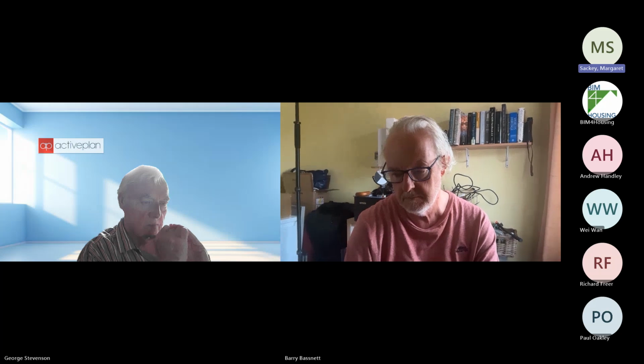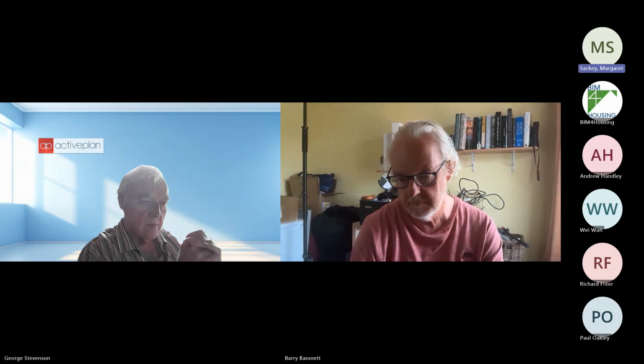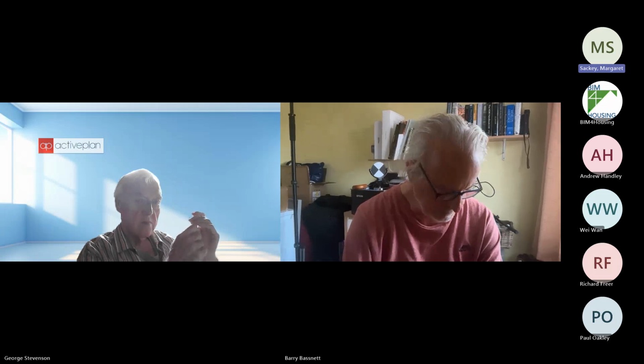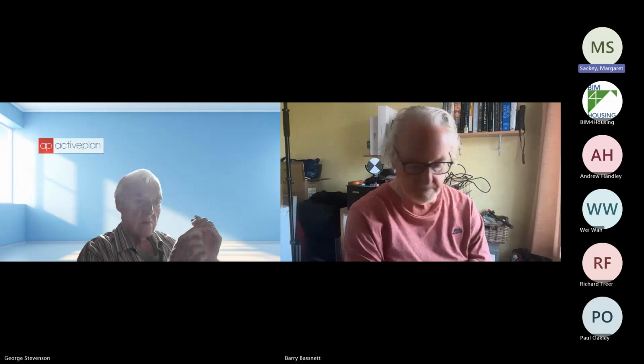And for my money, myself and Patrick, we do the health and safety file with these client managers you're talking about. We do the health and safety file checks of all the projects. He does the O&Ms, I do the health and safety file. If the as-built's not right, it won't pass. But every designer should be asked to review the as-built, because that is their design. The designer designed that element, whether it's M&E, structure, whatever it is, they should be asked, is this as-built correct?